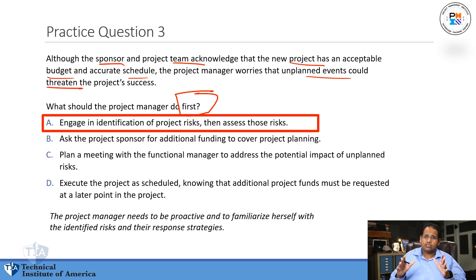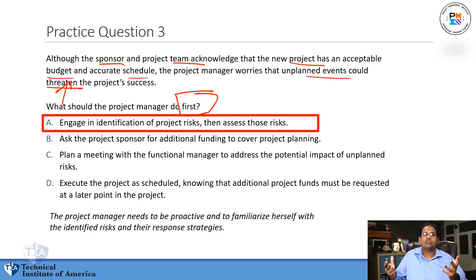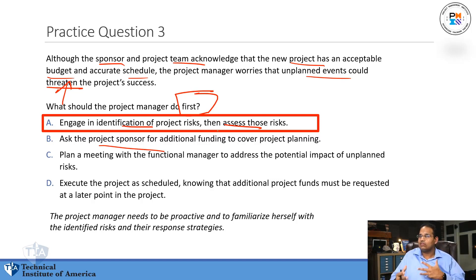The word 'threatened' is a tip here — a threat to a project is a risk, a negative risk. Remember in your study: positive risks are opportunities, negative risks are threats. So when they say an unplanned event could threaten the project, they're indirectly telling you this is some kind of risk. And what is the first thing you do when it comes to a risk? Identify those risks and then assess them.